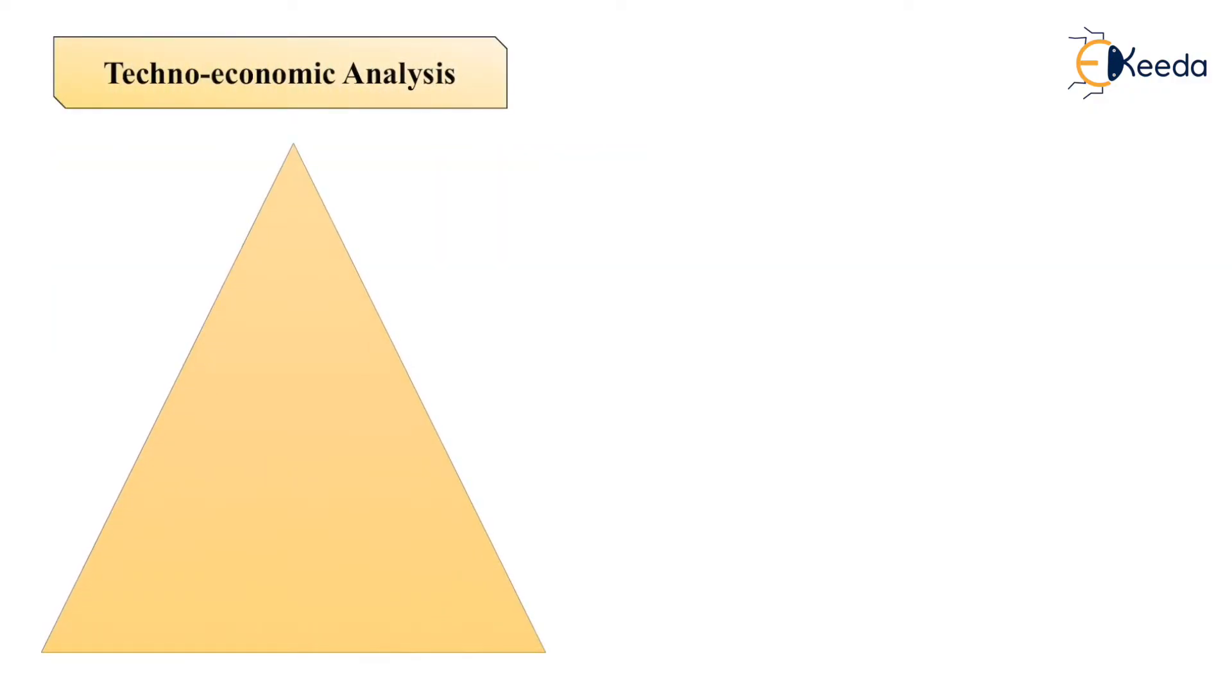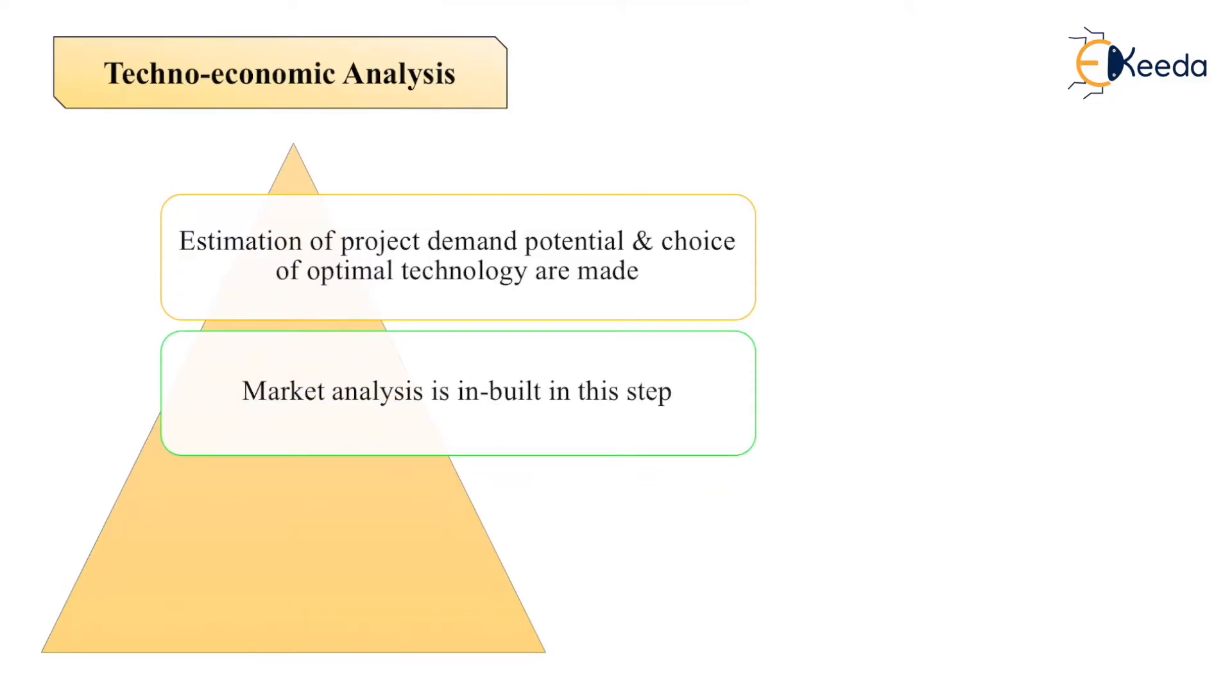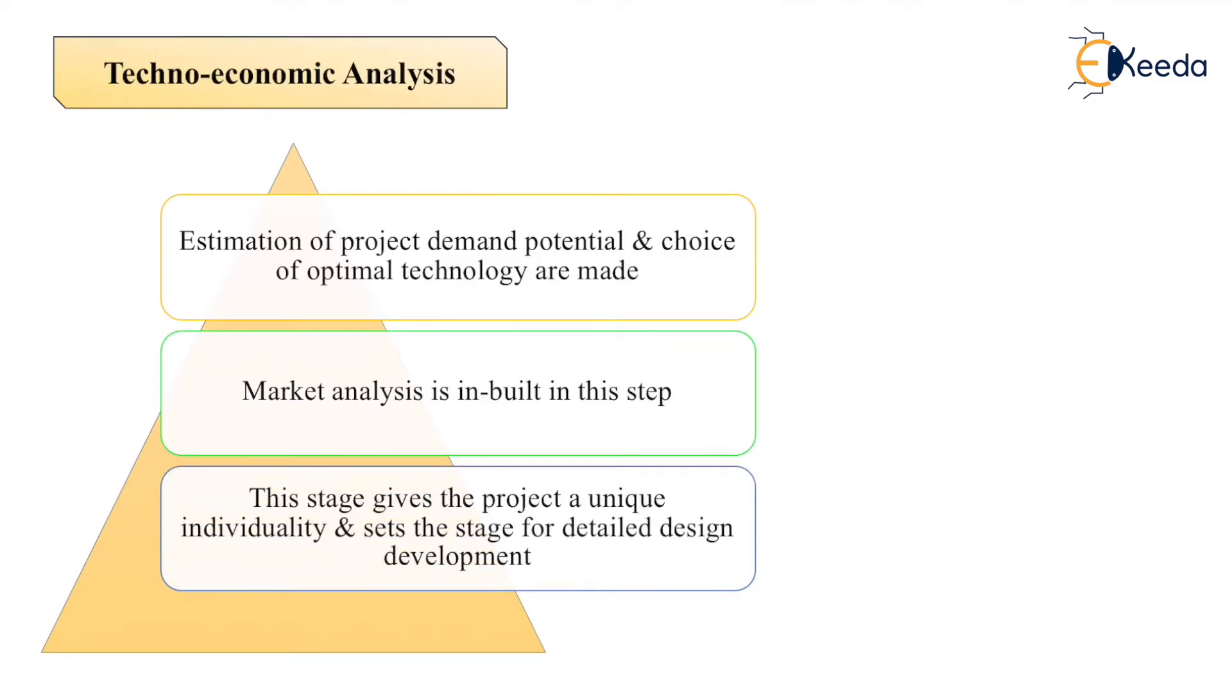Then we go for the second step which is techno-economic analysis. In this, estimation of project demand potential and choice of optimal technology are made. The technology we are going to select for this project is done in the second phase. Market analysis is inbuilt in this step, and this stage gives the project a unique individuality and sets the direction.